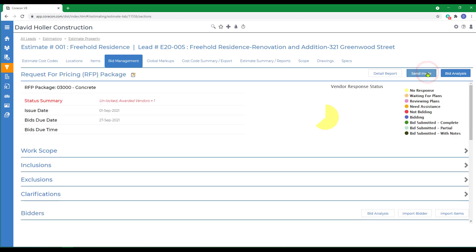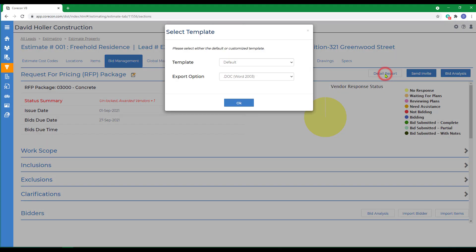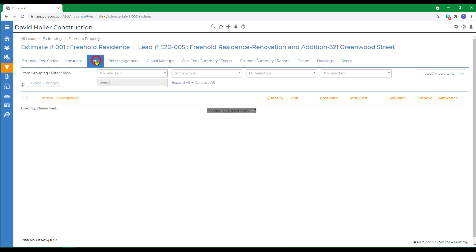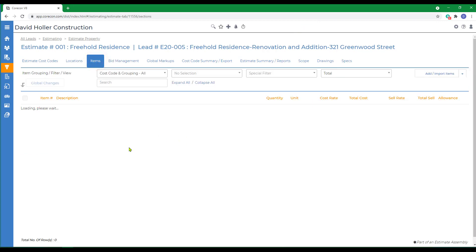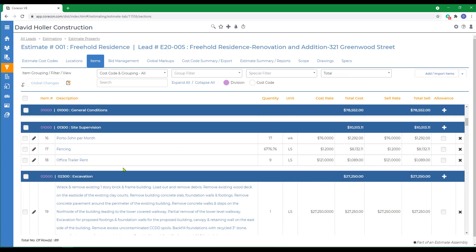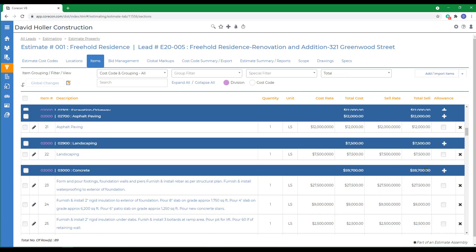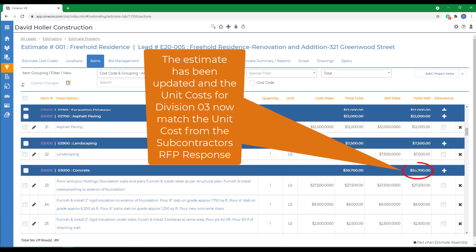Back to the package. There is also a detail report that you can print out. Now that I've accepted the bid or RFP from one of the subcontractors, if I go back to Items, scroll down to Division 3, I can see the total of Division 3 now matches Stika Concrete's bid.